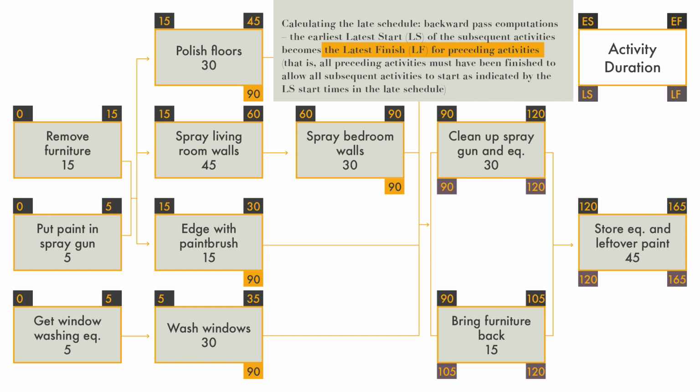When this successor activity needs to be started at the latest, the earlier it must be started, then it requires that all predecessor activities must be completed at the latest by that point of time. So we choose the smallest figure in the backward pass calculation.